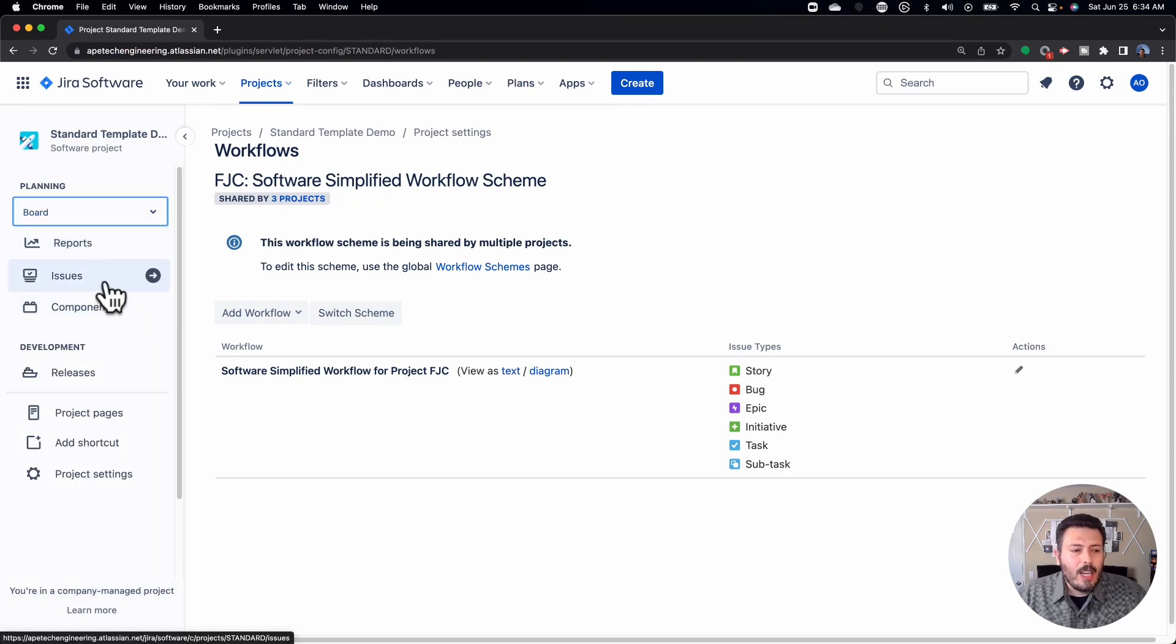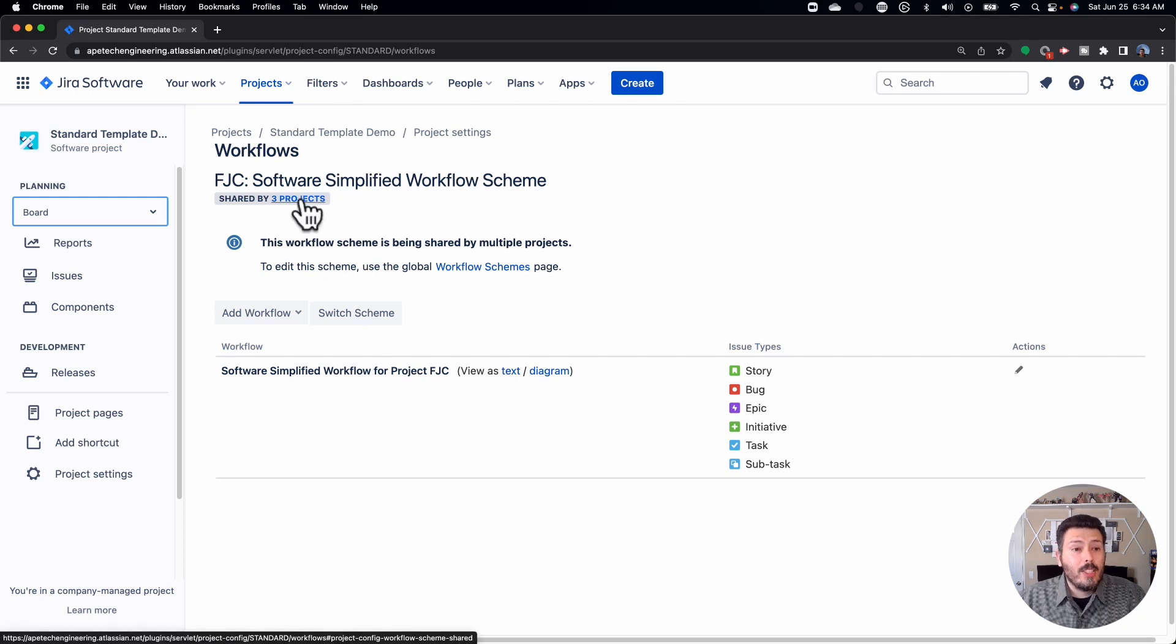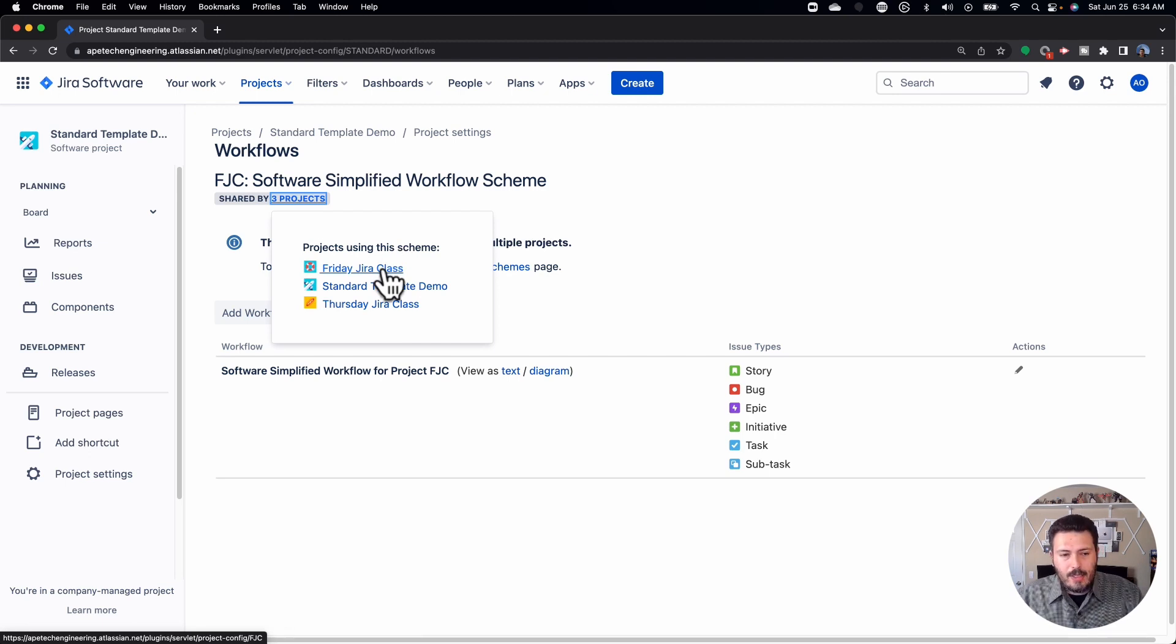But now I want to talk about a couple of gotchas. I want to talk to you about what could go wrong and why you should be careful when trying to clone this. Okay. So the first thing I want you to see is the shared by three projects. And this means that all of these three projects share the same configuration. This is a good thing. And this can be a bad thing. This is a great thing when you're a mature organization and you just want that boiler plate template. Just press them out and just hash out projects. They're all the same. This is bad if you haven't made up your mind on what your ideal setup looks like, because the second that one of these projects wants to take a path off the beaten path, things will go wrong. You cannot at this point make any modifications because if you make modifications, you will not just impact that one team that's using that one project. You are now impacting three teams that are using three different projects.